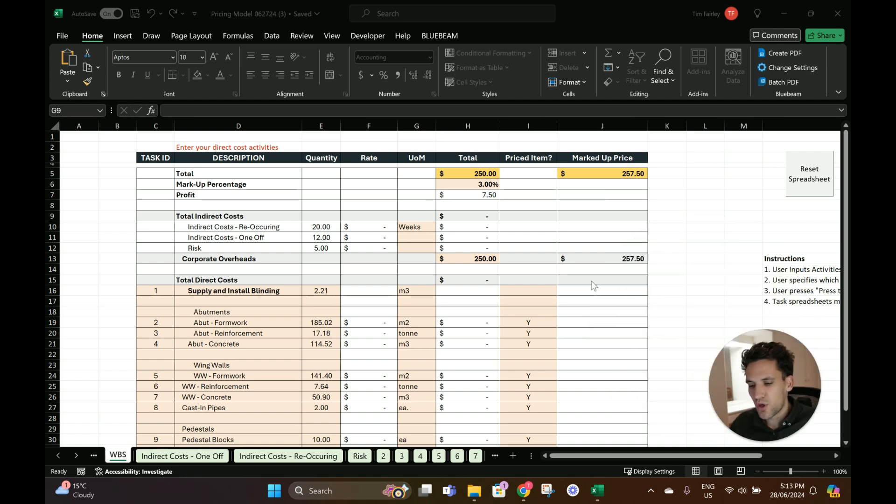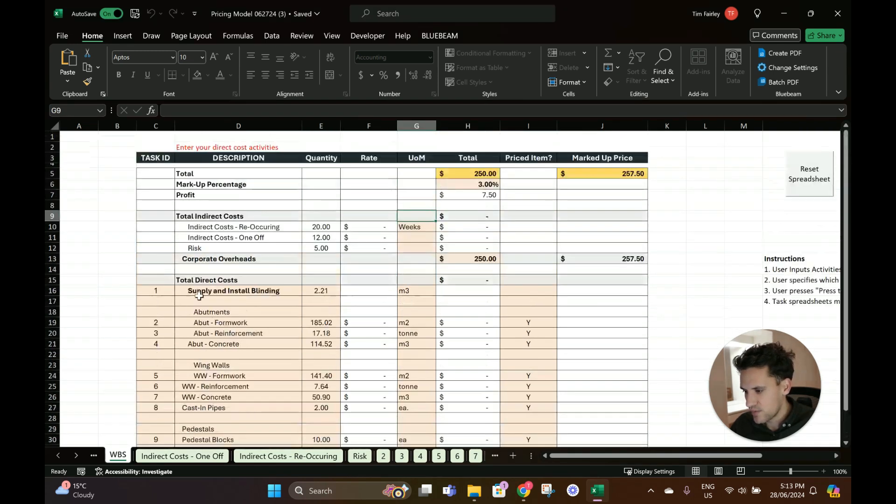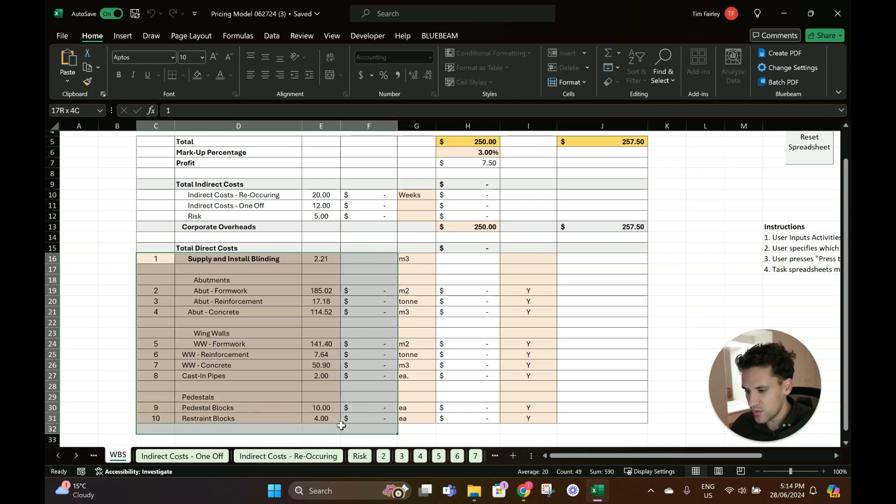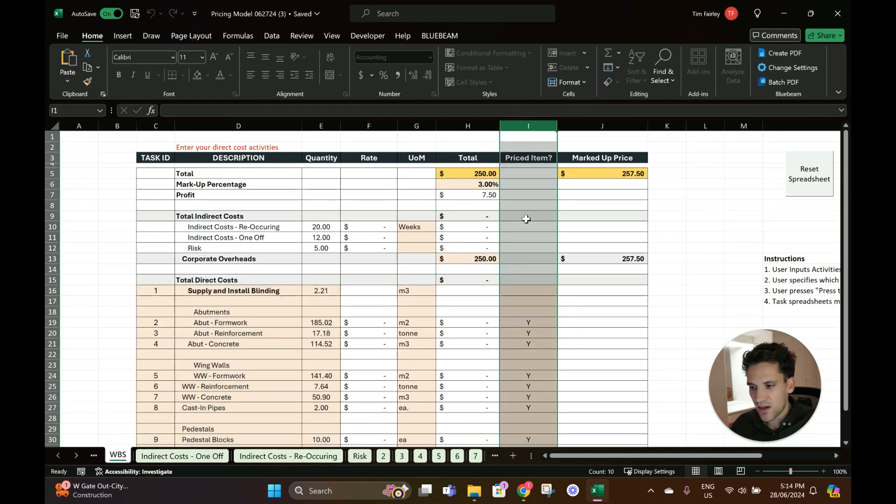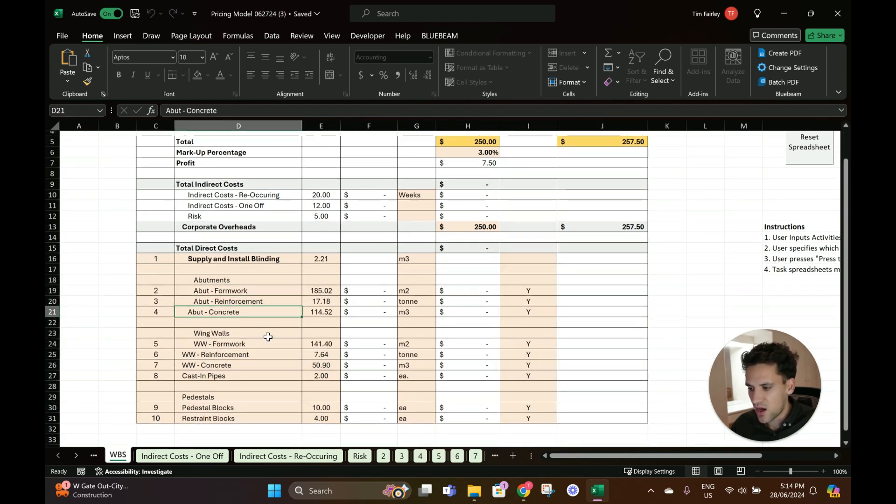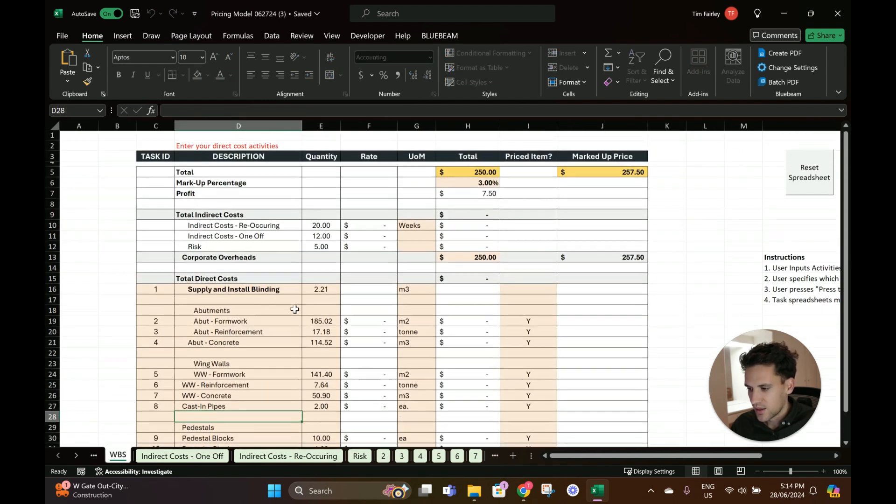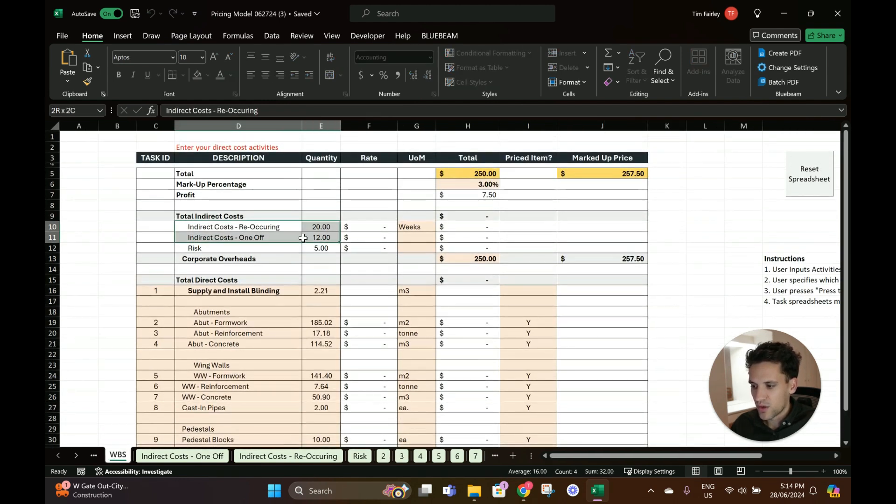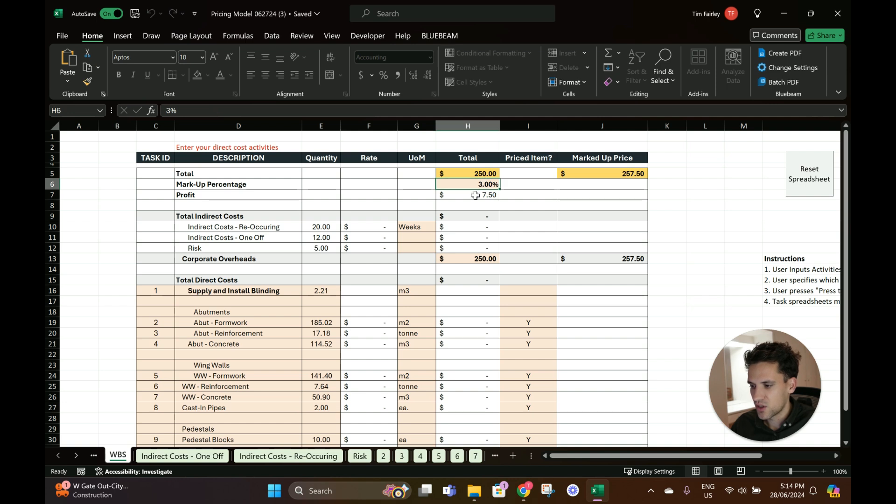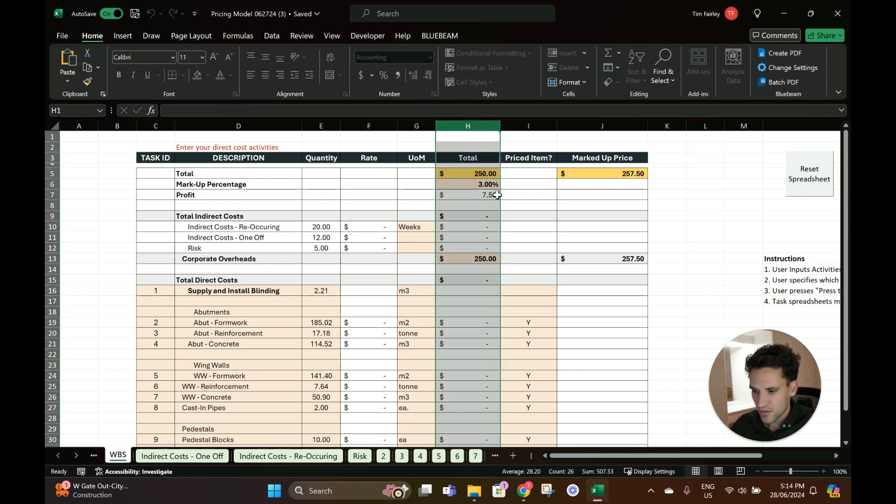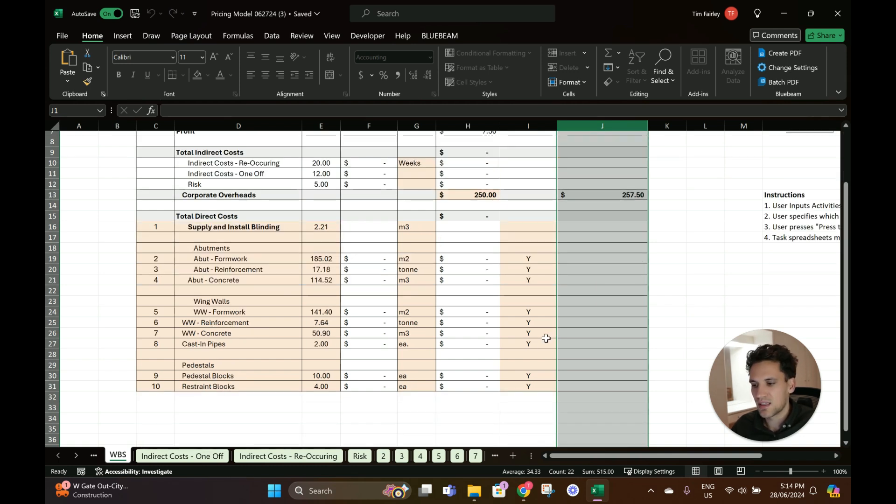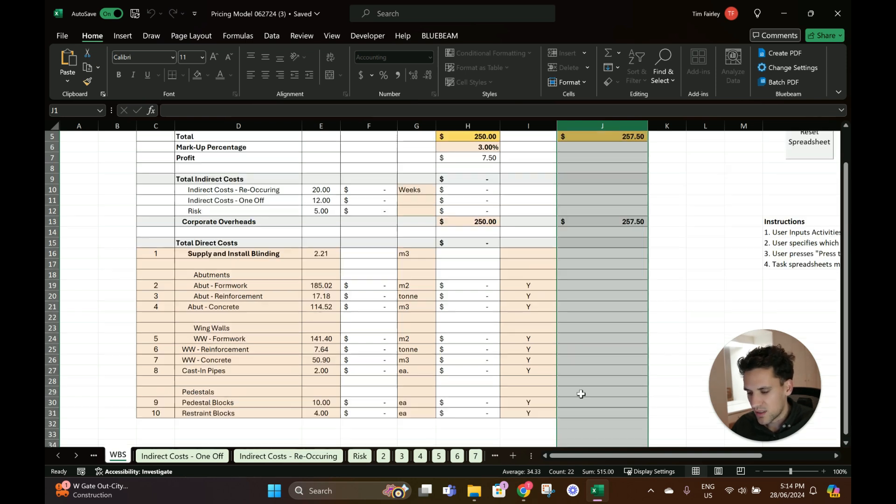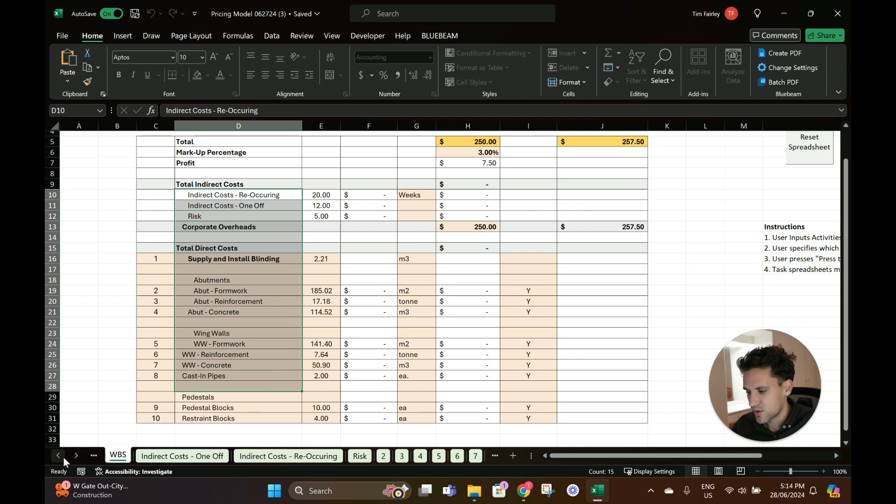I'm going to quickly fly through how the spreadsheet is set up. You have the WBS or work breakdown structure tab which has your bill of quantity items which for any job you can change and set as you please. In the priced item column you put a Y for each of the items you want pricing sheets created for. There's two columns: the cost column and then the marked-up price, so it'll put the markup on these items. If you want to submit this to a client you could simply send them the priced item column and the priced items.